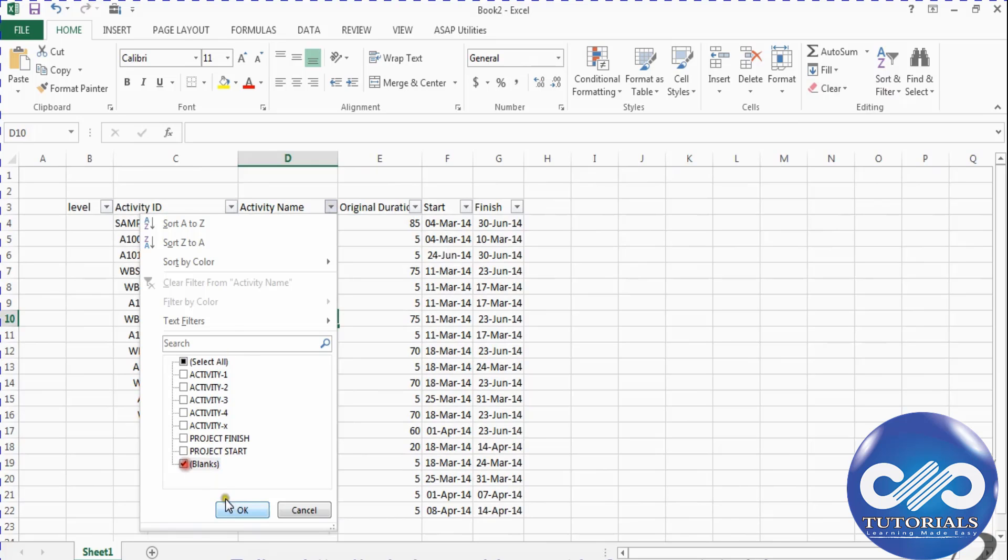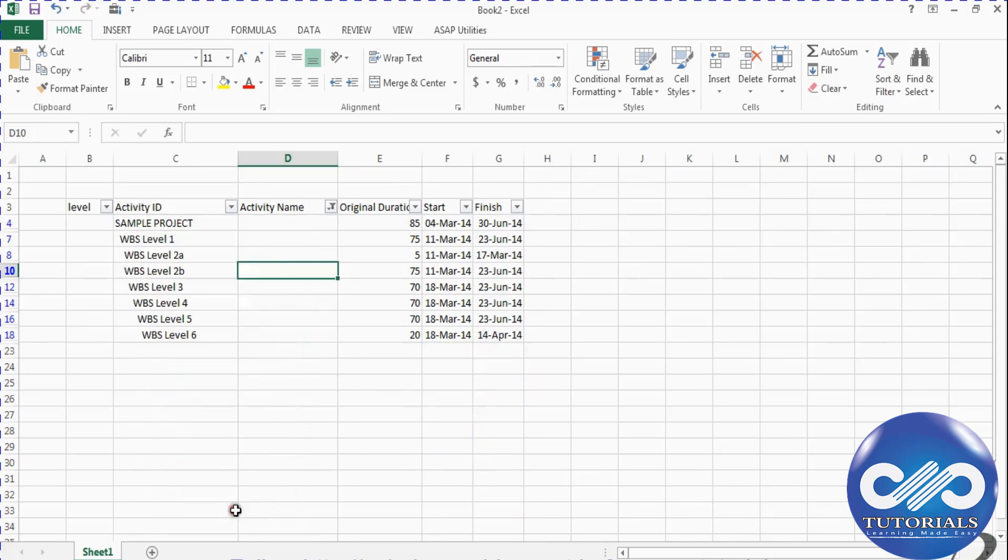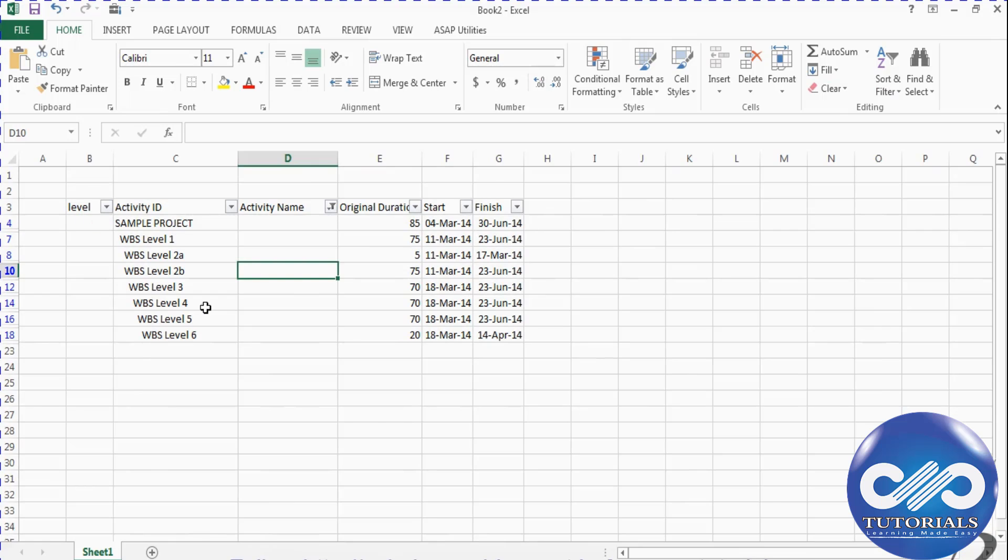Filter the blank cells. This means these are the WBS line items because WBS line items don't contain any activity names. We can observe that these WBS names are prefixed by a certain number of spaces based on level of WBS, like level 1 with 1 space and level 2 with 2 or 3 spaces and likewise.